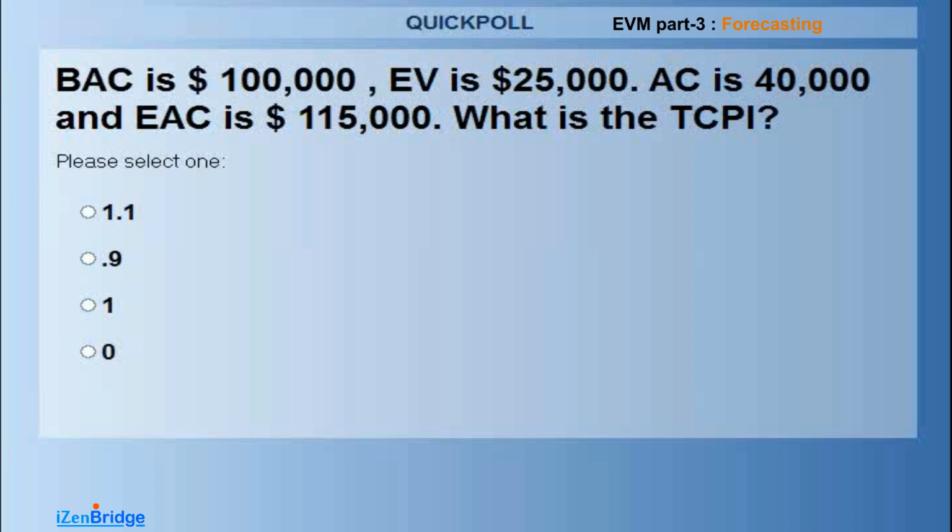It means that the remaining work will be done as per the budgeted rate. So that's why it becomes an atypical scenario, where for the remaining work you don't have to increase or decrease the budget. When the current cost variance trend has to be followed, it means your budgeted rate is no more relevant. Your new cost trend has to be followed.